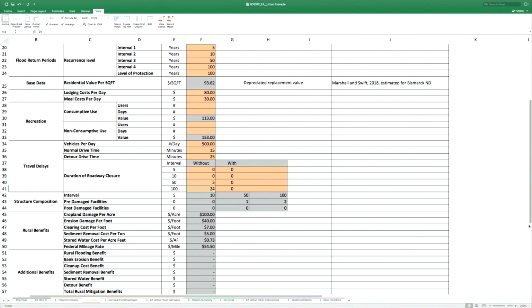It's not fun talking about fatalities, but you also could use a control area. What happened in this area the previous 10 years during this time period? How many deaths were there? There may have been 6, and during the flood there may have been 6. The flood may have caused those 6, but there were 6 before. I used to think about that when in Vietnam, for example, 58,000 of my colleagues didn't come back. Well, how many of the people who avoided the draft got killed instead of going there? You need to control.